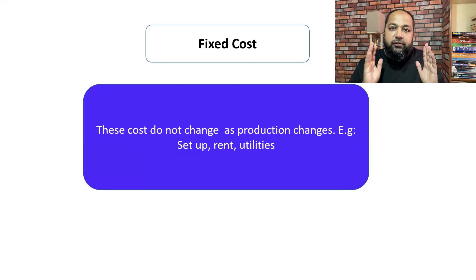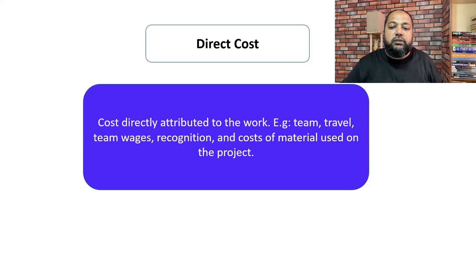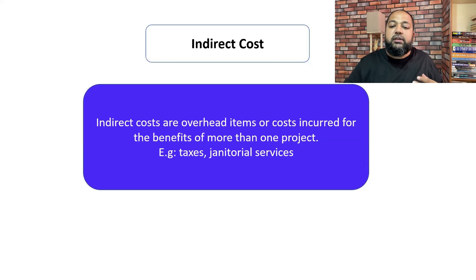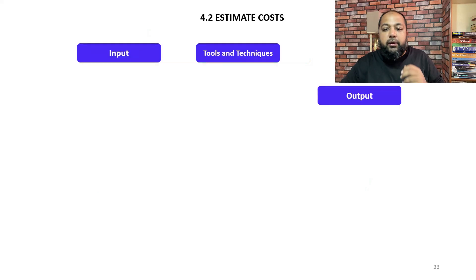Fixed cost is something like setup cost, rent, utilities — things which are fixed on the project and won't change throughout. For example, your office cubicles and office rent are fixed costs. Direct cost includes things like team travel and team wages — cost of materials used directly on the project. Indirect cost includes taxes, stationery, or janitorial services needed to maintain workplace hygiene. Remember these four types: variable cost, fixed cost, direct cost, and indirect cost.